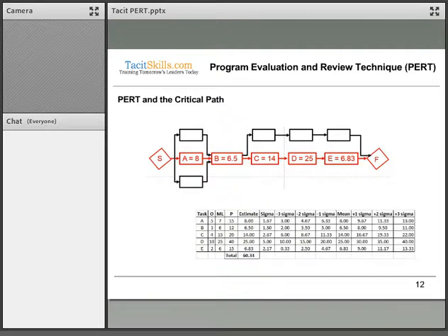Now, that goes for if we look at activity level, but we know that activities can be either over or under. If we look at a critical path, at our network diagram, we've got activities A, B, C, D, and E on a critical path, and we've got some other activities also, but they are non-critical activities, so they do not determine the duration of the whole project.